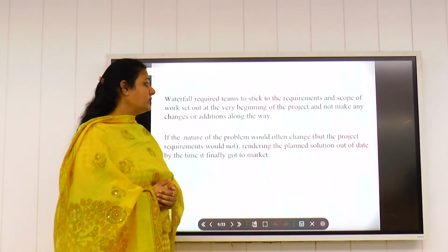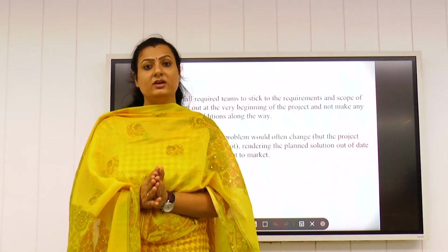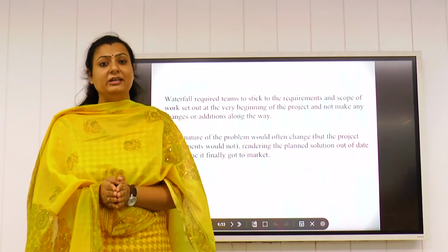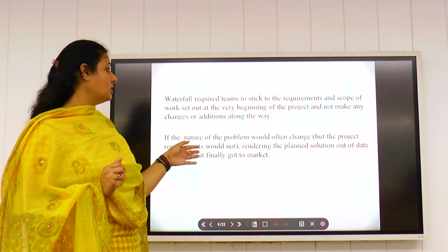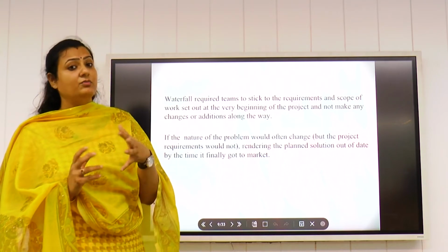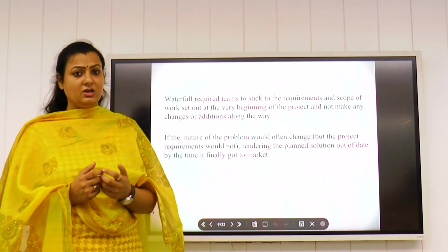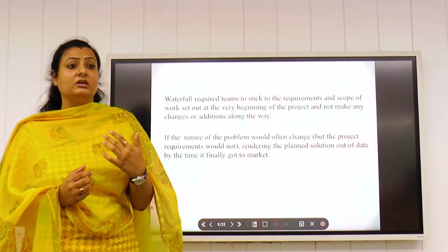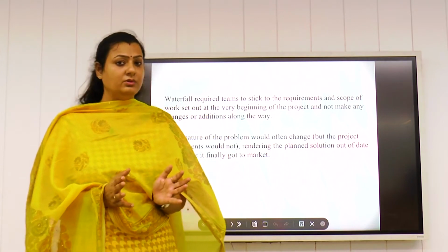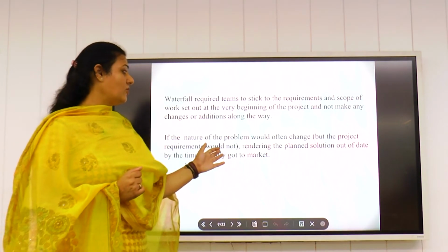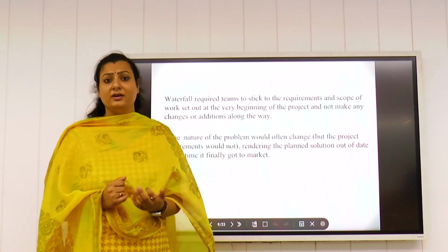The waterfall model requires the team to stick to the requirements because the requirements are fixed. So the software development team sticks to these requirements, which are taken from the client at the beginning of the project, and they do not make any changes. If the client wants to add some new features in the project, they are not able to do that. In nature, problems often change, rendering the planned solution outdated by the time it finally goes to the market.